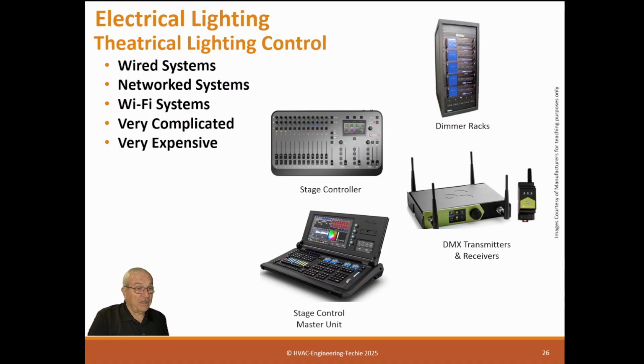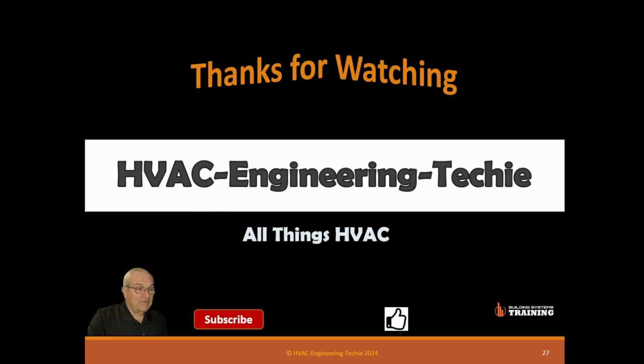If your project has stage lighting, that should be done by a specialty contractor and started up by specialty people. The reason is because their criteria are much larger than your criteria. There's a whole bunch of programming and software involved, so it can get very expensive and very complicated quickly. But if you have to, it's there to do.